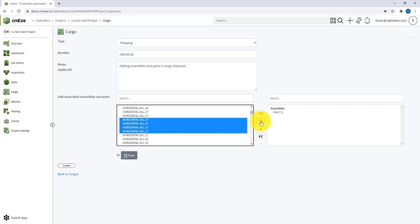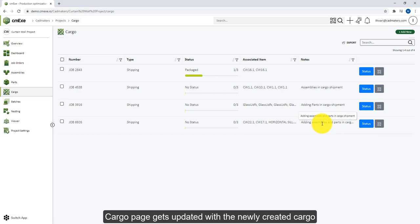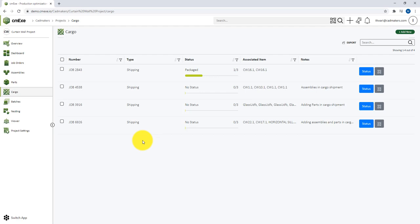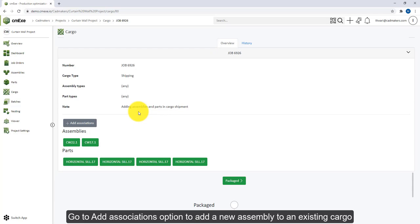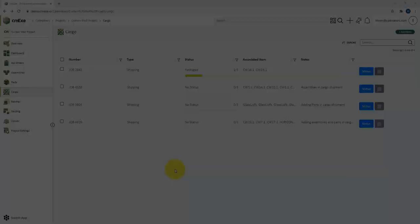CMXC provides an option to add additional items to the cargo by going to the respective cargo, clicking on the cargo ID, and then selecting the Add Association option. You can add the new assembly in this window, and you can see the newly added assembly now appears under this cargo. You can also use the assembly or parts page to create a cargo.